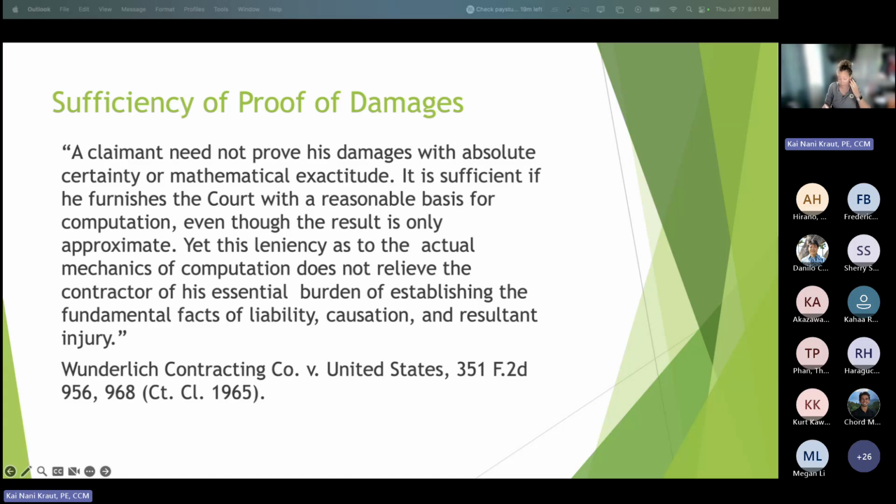On Makaha, we were really diligent with it, and Danilo helped with that. I think Gord helped with it too. If they didn't settle, if they didn't do it, we were doing written extensions. So the fact that in November of 24 they came up with, oh, by the way, here's all these costs. It's like, whoa, I thought we were dealing with two things. We were very diligent about dealing with the two things, and now you're saying there's this other thing. This is stacking everything at the end. Now that we're talking about what your LD amount is going to be, they say, oh, wait a minute, we didn't know you were going to charge LDs, here's some more costs. So I believe in the end, we will be denying it at the project level.